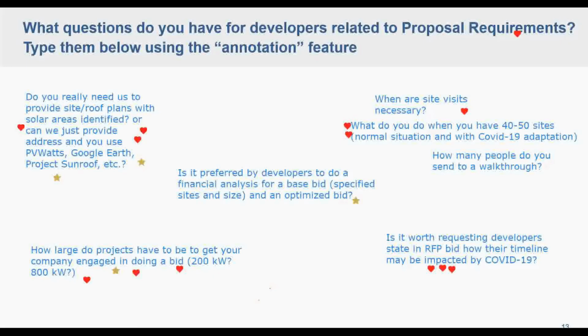A combination of that and qualitative phone calls with the main point of contact at the developers helps us determine if it's a project they'll be interested in. Our RFPs are now invite only, so we invite a max of 10 developers to review the RFP, and by letting them know the list of 10 people we're talking to, they can know it's worth their time to respond to the RFP.